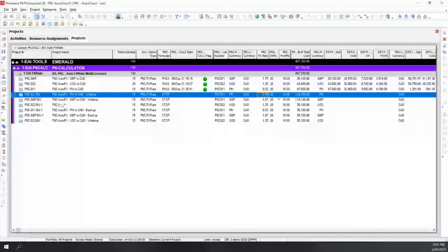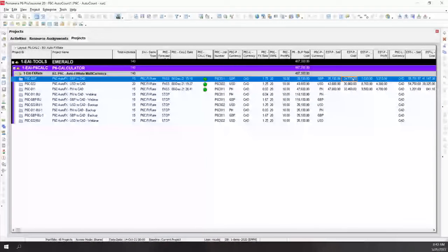Now, let's touch on some other factors that our clients want to track. So we often have an overhead, we often have a profit target. Now, we usually have the cost, expected cost. So here's the example here. Now, we have a factor for the overhead, factor for the profit, and those three total together is what we sold the project for.